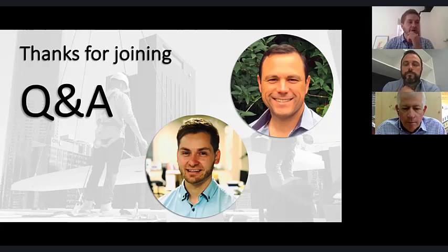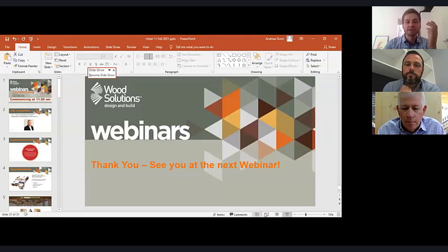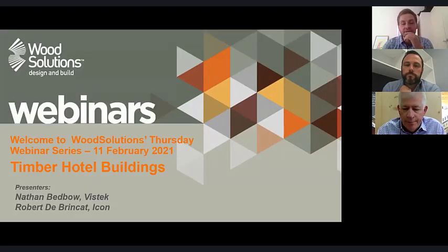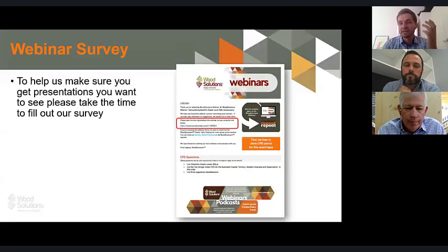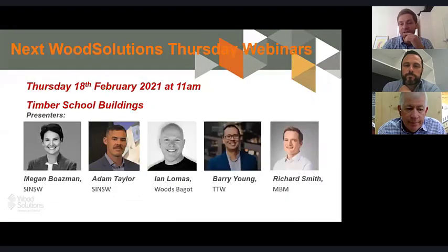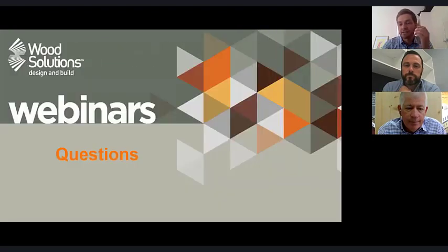Yeah, and I know that in previous years, I don't hear about it as often these days, but that whole ECI approach, and I still don't think there's too many projects where that's really been done properly. Lots of the time it's actually still just that term for the contract, and that's after tender, where, like Rob's saying, the design's already done, and your hands are tied in the approach that you can take and the value management that you can add to it.